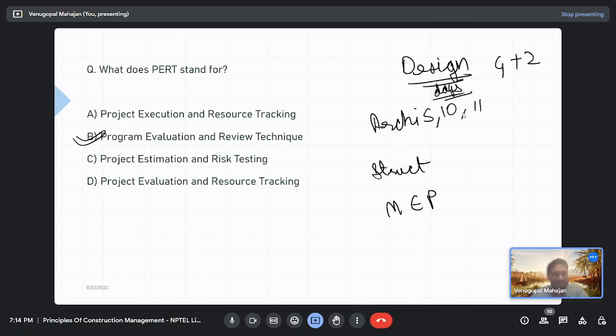Okay. See, it's the architectural design. If it is in front of me and I talk to the client for half an hour, then for me it would be a 10-minute job to give him the line diagram, and another 1 hour job to give him the 2D CAD drawing. So this is what I think for the first architectural drawing. But if you go for revisions, it could take like 10 days. If the client is not even ready to agree, then it could go for months also. Depends upon client requirement.